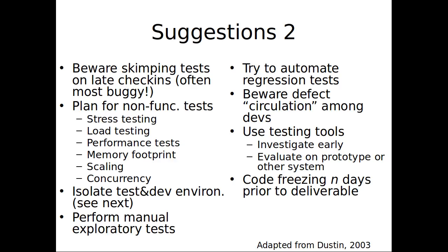They're eager to test, able to test, and they don't have the code base, which means a lot of the team's time and work is going to come to naught. So try to freeze early, even if it means a feature or two not making it, I would strongly encourage. If you tell me, look, we couldn't include these two features because we did a code freeze 4 days before, I'll say, good call in most cases,